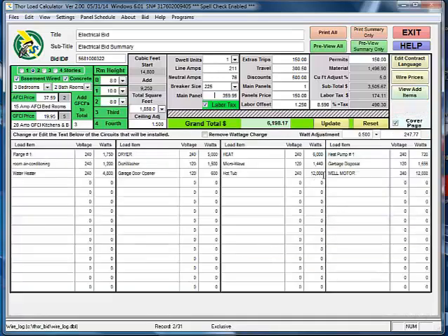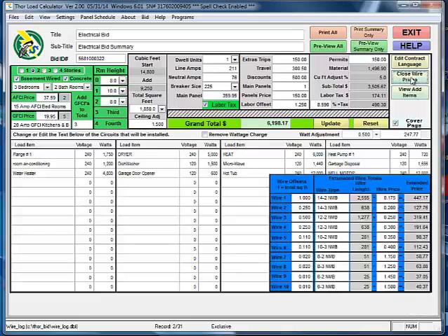Moving on, if you need to change your wire pricing, click the wire price button, and note here that 1.000 indicates that square footage of 1850, so you'll have 1850 times a price of 17.5 cents a foot, which will give you $447 for 14.2 NMB wire. The calculation assumes that you'll use 1 foot of 14.2 wire per every square foot of house. If you find that it's a little more or a little less, you change it here. For instance, if you find you need a little bit more wiring, then you change it to 1.1. And then when you update, notice the price change. It went up to match your adjustment here.